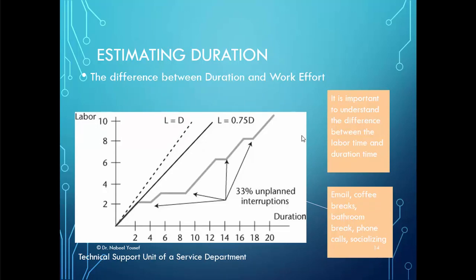A diagram shows the difference between duration and work effort. The labor time is 70 percent of the duration time, since there is almost 33 percent of unplanned interruptions such as emails, coffee breaks, bathroom breaks, phone calls, and socialization. We have to consider this when estimating the duration and comparing work effort versus duration.